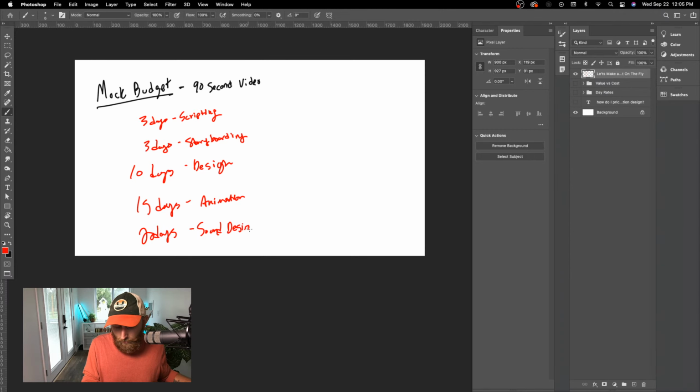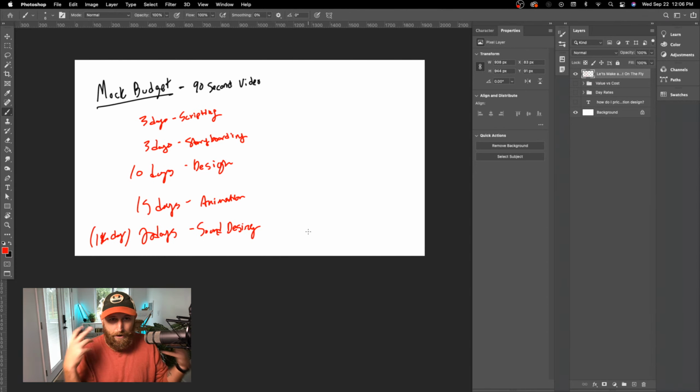And so, but let's say I'm not going to do the sound design. I'm going to need to farm that out. And let's say the sound designer actually charges $1,000 a day. So it's actually going to cost us $2,000 to get this thing sound designed as well. So obviously now with each of these, we can start to put together like a Gantt chart, think about how long it's going to take us to produce this.